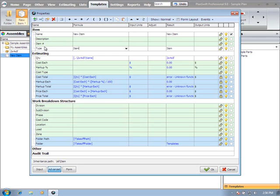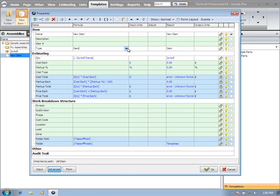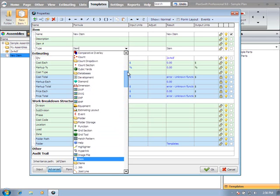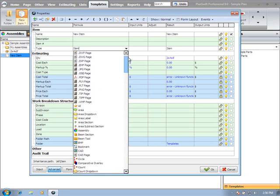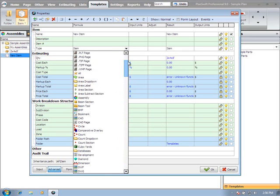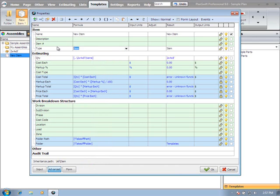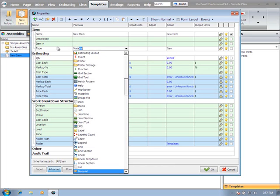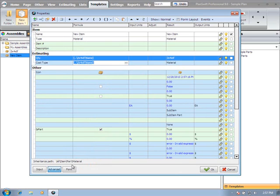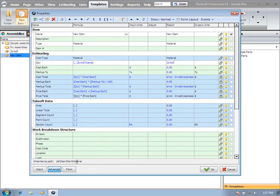The type - this is a pretty important one here. The types drive everything in PlanSwift. All of the objects are essentially the same - they're all made up of properties. And the type sets what properties are available to the item. If I look at the drop down list, you'll see this nice long list of different types within the system. Typically, all the end user really needs to be worried about are going to be the material, labor, equipment, subcontract, and other. On the types, unless you're getting into some really custom stuff. So if I were to change this to a material item, I'll just type out material, hit enter. Now that's going to load up the material properties. And you'll see some of those have changed as far as what's available.